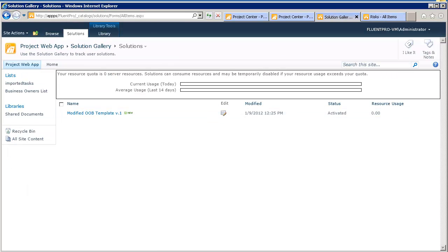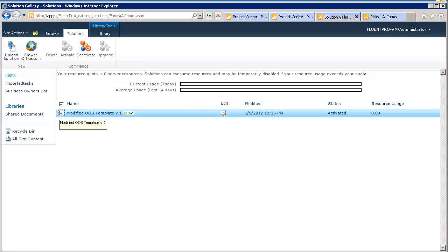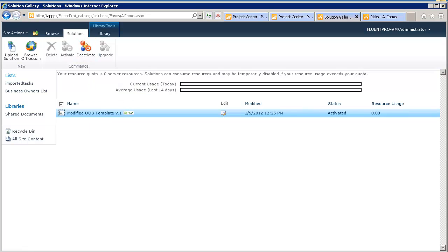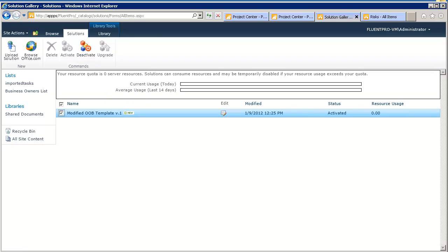Another recommendation for some Project Site templates. If you created several Project Site templates, every template can have different versions. So, to delete the Project Site template, initially, you need to deactivate the template. And since you can have multiple versions of the templates, you can activate and deactivate specific versions.